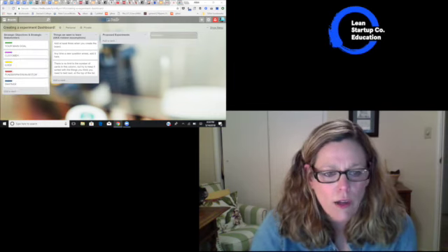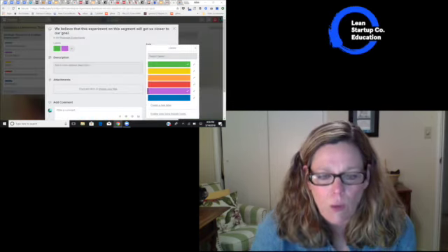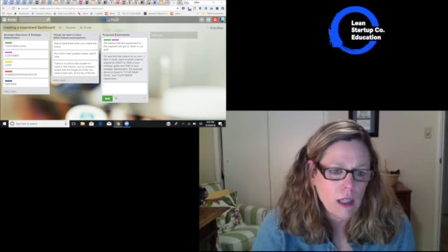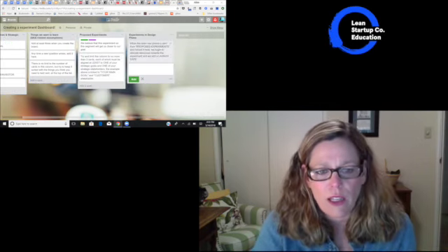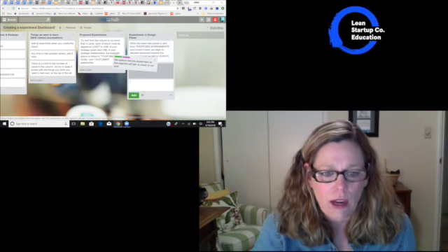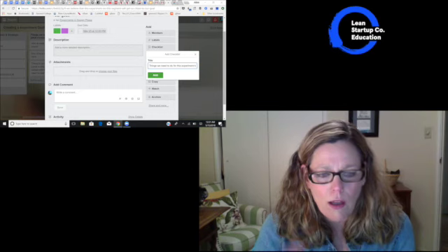Hopefully they've only got 1 or 2 tests that they're working on at a time. So you want to really limit that work in progress or test in progress. They're prioritized in order. And then there's columns for various statuses of the work to keep track of things. So there's a planned column, a blocked column, a build column, and then an in-flight column.